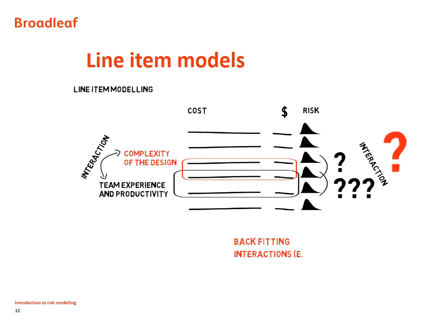Not allowing for interactions such as that between the cost of overheads per month and the duration of the project is a problem with line item ranging, just as it was with risk event-based models. In some very simple situations, or as a small part of a larger task, a model of this sort might be useful, but it's not a good choice as a primary approach to assessing project cost uncertainty.